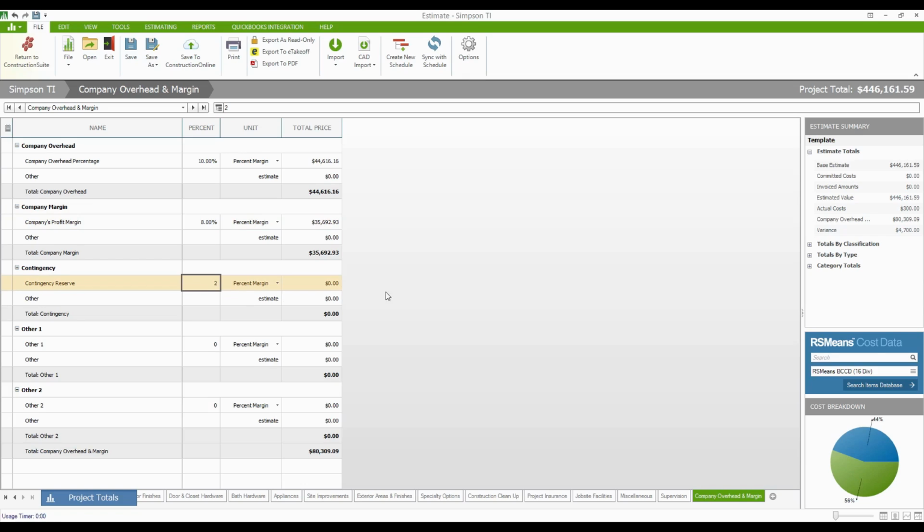You're still setting aside 20% of the contract value to go towards covering your company's cost of doing business and so on. So margin is always going to be based on the overall contract value. You're setting aside a percentage of the contract to cover your margin. If it's percent of costs, you're adding to the cost of the job to come up with a new grand total. So again, it's just the number that you're comparing against. And if in doubt, if you guys do fixed fee contracts, chances are you need to use percent margin. If you're doing cost plus, odds are you're going to need to use percent of costs.